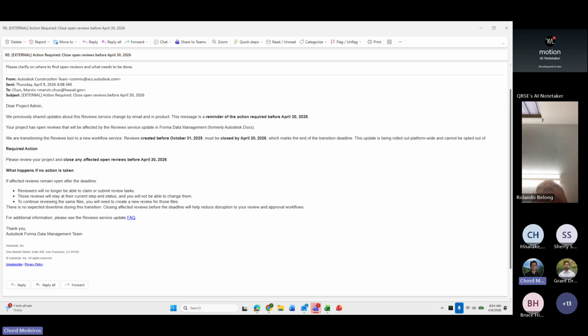Project closeout submits and reviews. Yes, but project closeout submits and reviews are not submitted within ACC reviews. So I don't think that should be an issue. This is just for the documents that are submitted through reviews, and by default on the template, those things are going to be weekly statements of working days, certified payrolls, things like that. Those recurring submittals that should be reviewed every week.